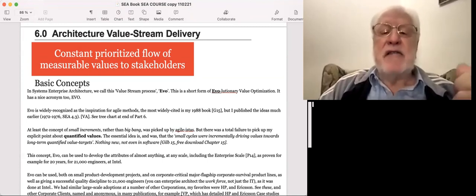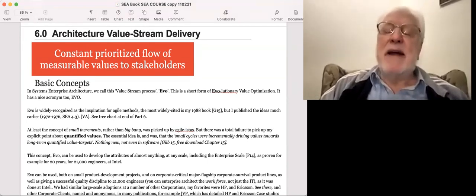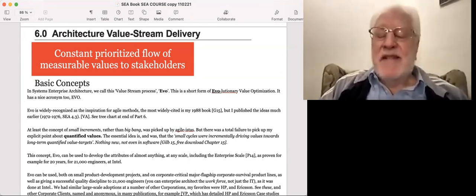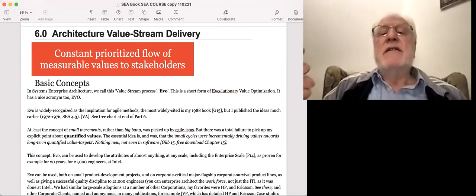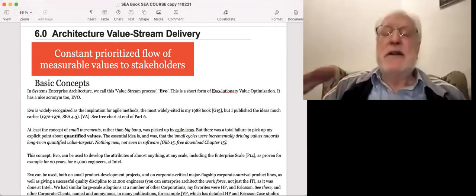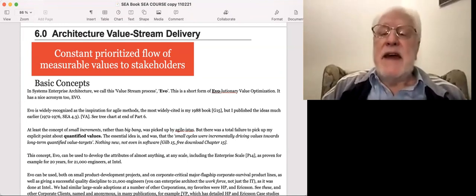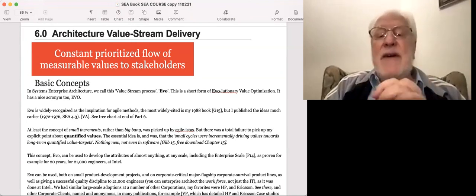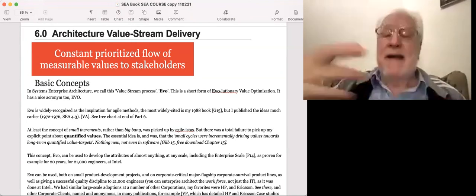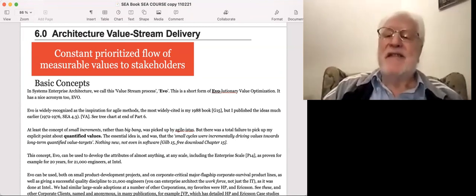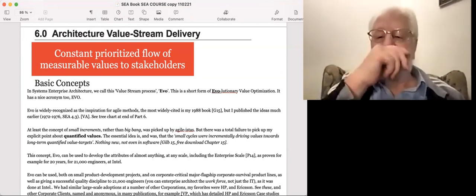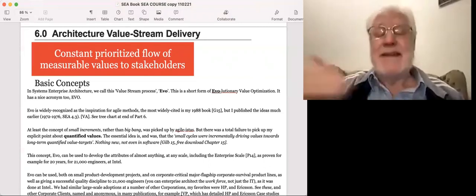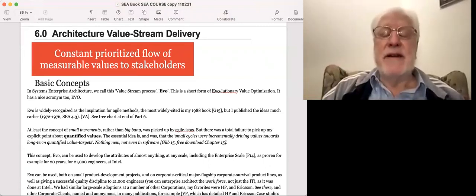I don't know all the details. What they did is they simply said, of course, this will go at the expense of accuracy and credibility, but we can't spend 6 months measuring things. We need feedback pretty close to the end of the week. So they had a combination of deciding to have simplified measures, in other words, leading indicators rather than lagging indicators. You know about that. And finally, they found that some forms of testing did demand a full week of proper testing, say systems integration testing, and they gave it that time, and the feedback did come a little bit later. So good question, and I hope the answer was interesting.